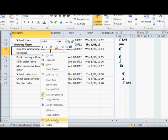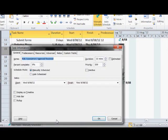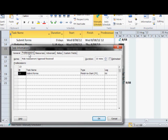Right click it, and select information. Move to the predecessors tab, and then under the lag column, add 10 days lag and select OK.